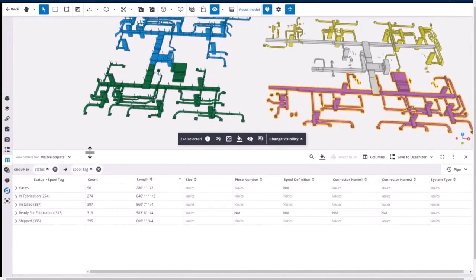But at a high level view, we can see in the installed section, we've got 560 feet of installed ductwork. And down on the bottom there, we've got 2,600 feet overall for this level. So just with those few numbers, we can start to kind of digest again the data behind what it is we've modeled, more on the project management and field side of things, using that data outside of purely just for coordination.